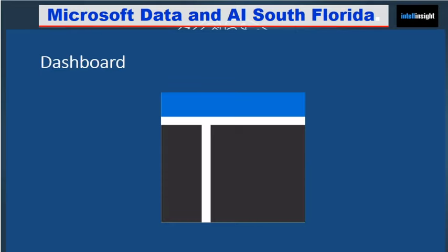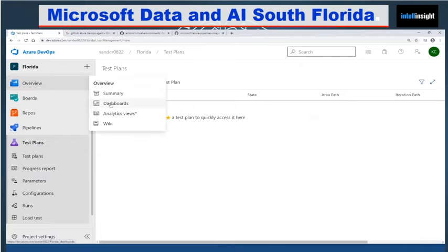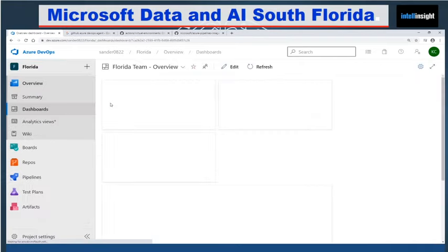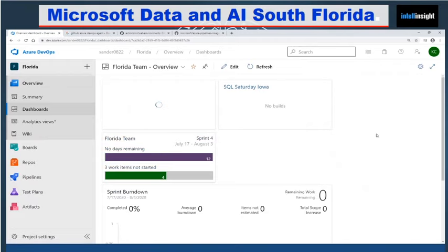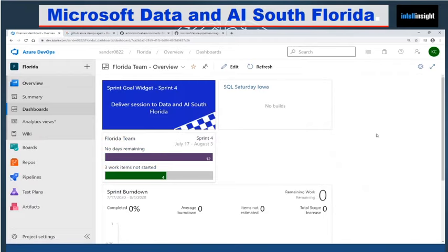Anyway, Sander, to be honest, there are other features I'm looking forward to the team using in Azure DevOps. For example, if we go back to it, I'm really looking forward to using all these different dashboards for things. And I think you might find this one helpful as well, being a Scrum Master for your daily stand-ups, because you can put it there in big, bold letters what the sprint goal is to remind everybody in your team every day. And of course, the usual kind of metrics that you can show as well, like your sprint burndown and your velocity, etc.